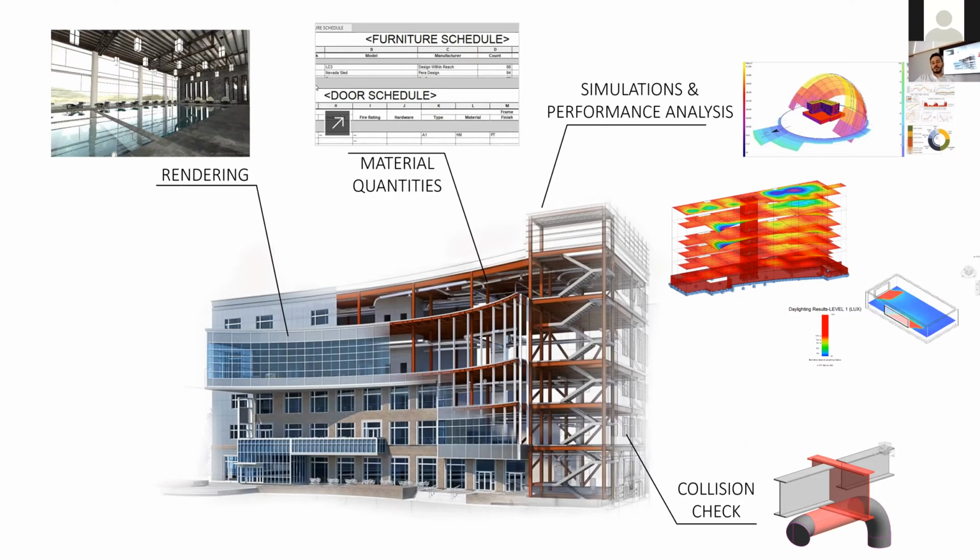And one of the important things, which is really important within the design phase and the coordination phase, is the collision checking, making sure that your structural engineering is not colliding with your plumbing in such a case, like in that case that we have right here.